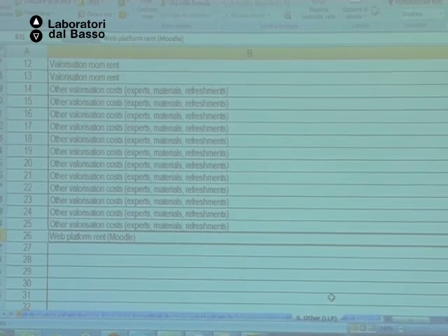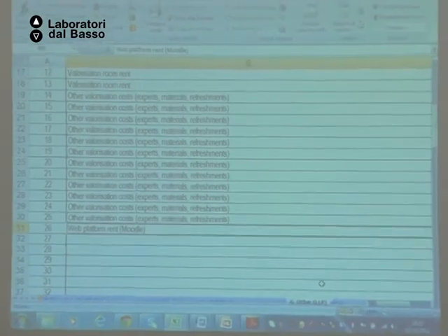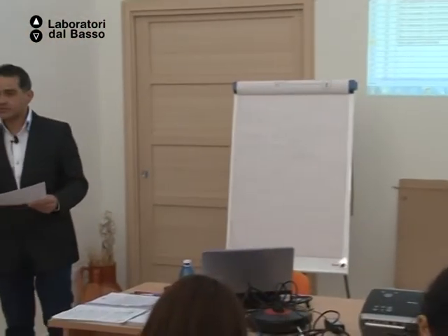So you've been talking a lot about this cost, but I would like to mention examples of other costs, which are bank charges. For example, the bank charges of a bank guarantee, travel and subsistence costs of third parties, other associate partners which are going to help you but are not a partner of the project, production, translation, publishing cost when performed by co-beneficiary organizations. Imagine that you have a company which is not included in your project, but they will contribute somehow. You can put these costs under the table other costs.